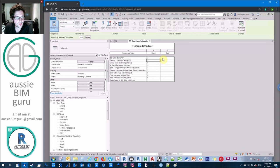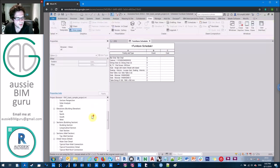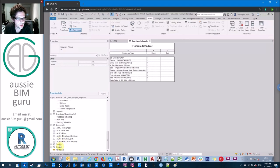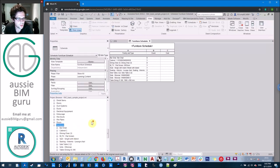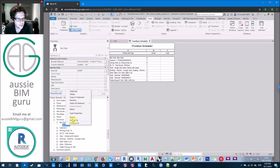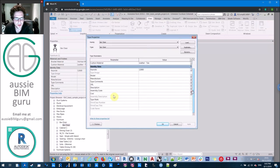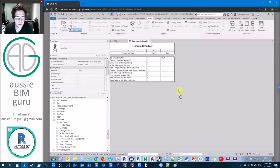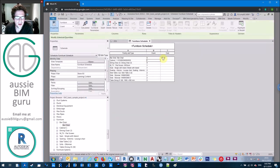At the moment none of these elements have a cost. There are two ways to add cost to a family — it's a special parameter called cost. Let's find this bar chair in our family browser and add a cost. In its type properties, cost is empty. Let's say this bar chair costs $120 each — that's the unit cost. Now you can see we have six of these. Note that this isn't a total yet, so we need to do some more work to make this into a total.